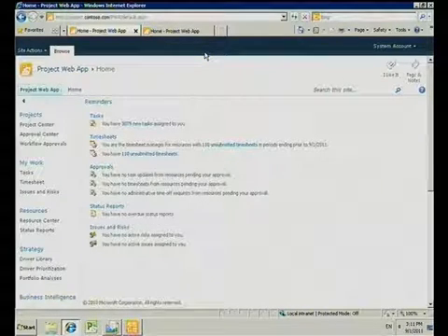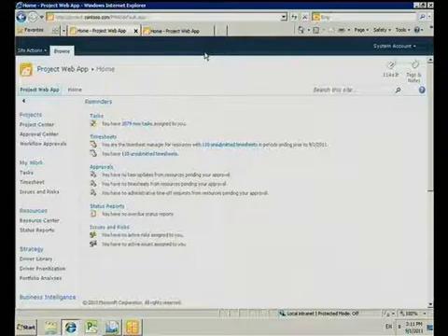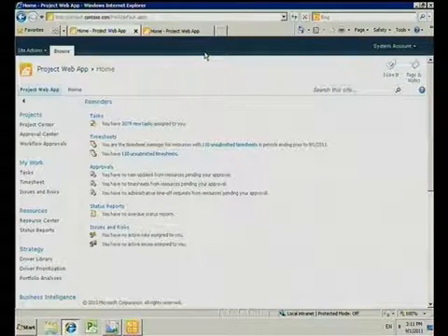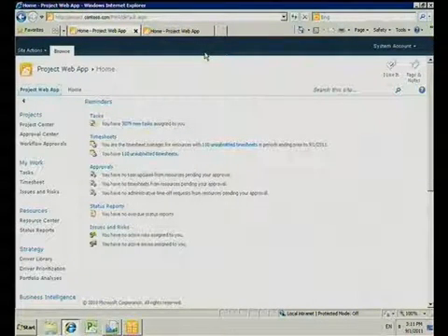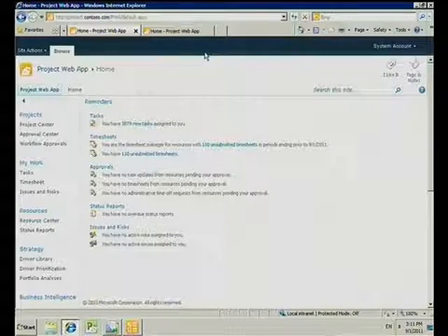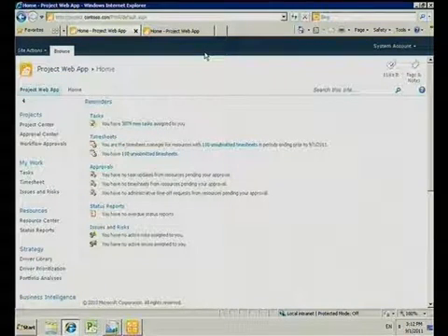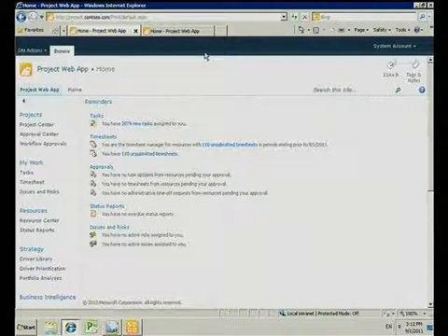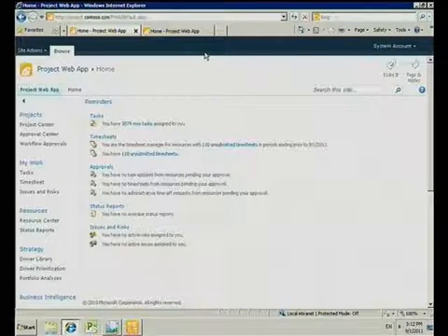For those of you who have not worked with Microsoft Project Server, we have actually two separate user interfaces. We have MS Project or MS Project Professional, which manages our schedule, and that's a desktop application, predominantly for project managers or for schedulers as such. But a vast majority of the users, team members, team leads, resource managers, timesheet managers, exclusively utilize Project Web App. So a user can simply type in a URL on the browser and has the information at hand. What you see here is the classical out-of-the-box home page of Project Web App.